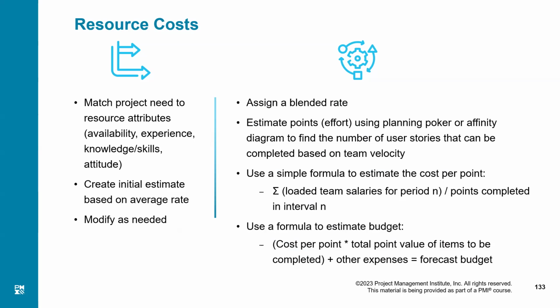Per story point, my cost is, what is it? 10,000 divided by 700. That is, what is 100 by 7? It is around $120. Is it right? Around $120 is the cost of one story point. So what should be the cost of the whole iteration? 700 multiplied by 120. That is my budget for this iteration, right?